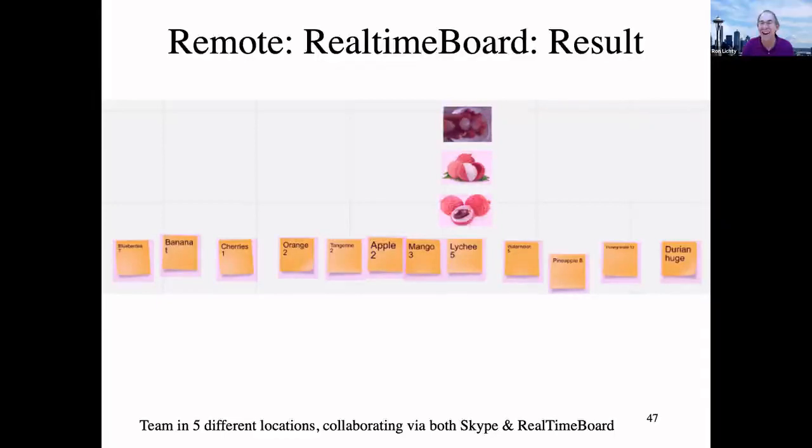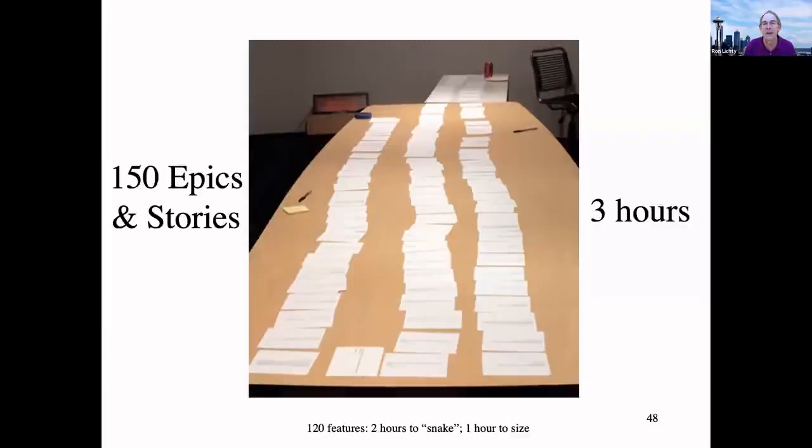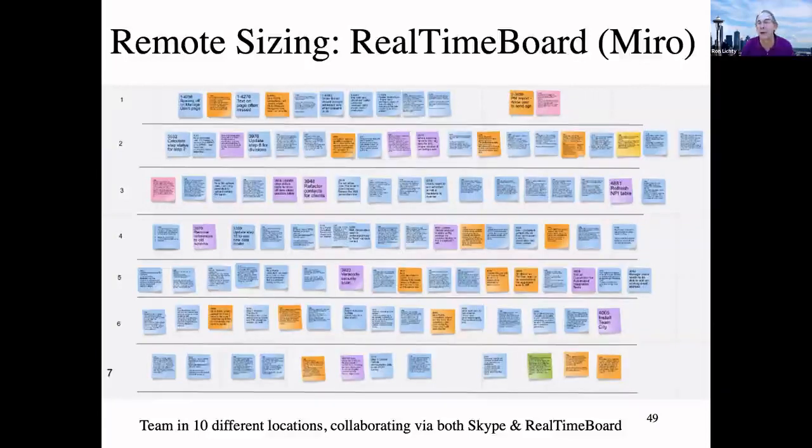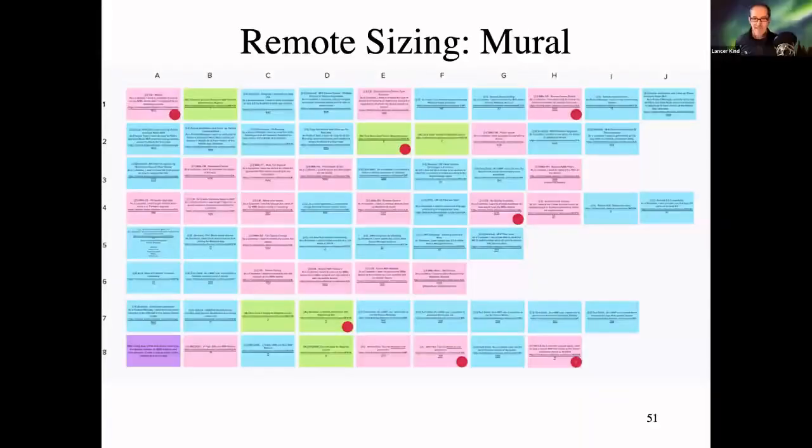I get it. So team by team, what each team expresses is the amount of time it will take for your team to do this work. So the team needs to be sizing its own work, and then it's valid for that team as long as that team's stable. And the result of that is when we're doing Jira cards and they're printed out, or when they've been transferred via the Jira to Miro or Jira to Mural link, we end up being able to sort our cards by smallest to largest.